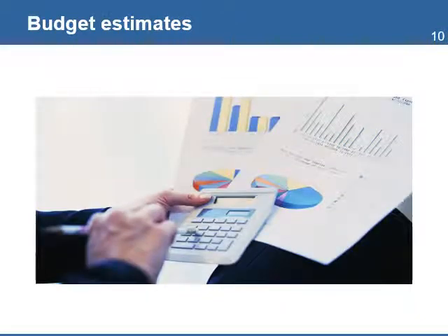The next step is to determine the cost of each requirement, which will result in the creation of the project budget. Budget estimates are obtained from the people responsible for managing the work efforts and from the people or units in the organization in charge of procurement, human resources, and finance. In most projects, labor is the largest cost area. The estimate should factor in vacation time, sick leave, breaks, training, social benefits, insurance, and other labor costs. Overlooking these costs jeopardizes both the scheduling and cost estimates.